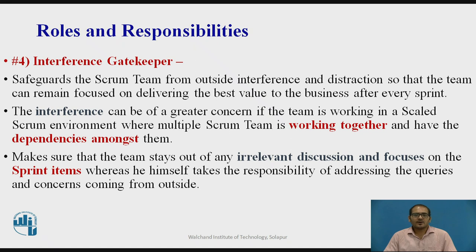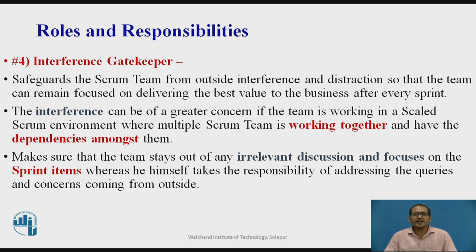Interference Gatekeeper: The Scrum Master safeguards the Scrum team from outside interference and distraction so that the team can remain focused on delivering the best value to the business after every sprint. The interference can be of greater concern if the team is working in a scaled Scrum environment where multiple Scrum teams are working together and have dependencies among them. He makes sure the team stays out of any irrelevant discussions and focuses on sprint items, while he himself takes responsibility for addressing queries and concerns coming from outside.